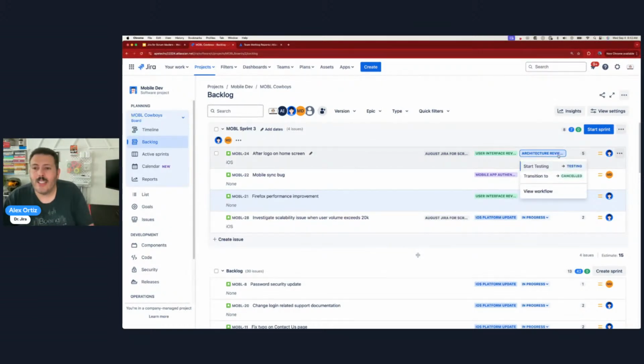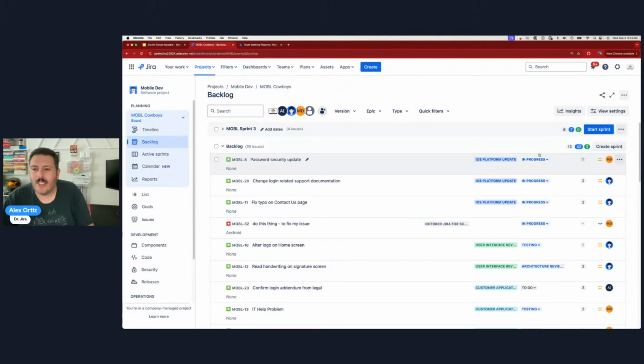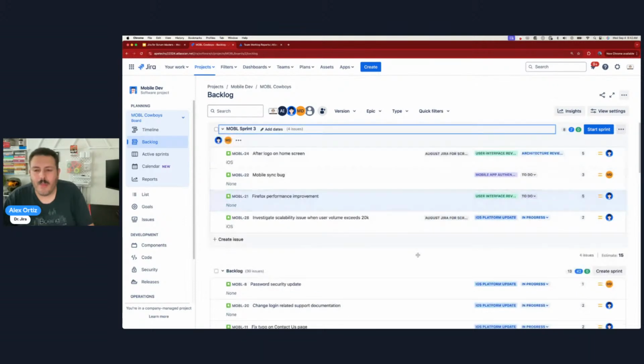The statuses here are less relevant. Expect to not always have everything in to do, because the harsh reality is that work will always carry over. I've probably worked on, I don't know, 600-700 sprints in my career, and I don't know that I've ever had a perfect sprint. So expect at least 20, maybe 30% of your sprint to carry over and roll over.